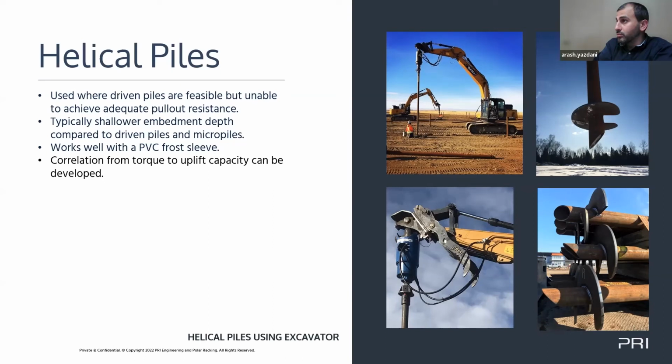As you mentioned, you can't get into sandstone or weathered bedrock with a helical pile. With a driven pile, I actually welcome that. If you can find a sandstone or a weathered rock layer within 7-8 feet, you typically penetrate that with a driven pile 2 to 3 feet, and that locks your pile in better than concrete. There is no popping that thing out. So with a driven pile, you actually kind of want weathered rock. Where with a helical, you're just looking for soft soil, no boulders, no cobbles. If you do start getting into boulder cobble material, there is remediation for that. You have to spin it out, dig, hoe pack, resurvey, reinstall, which can be pretty costly and time consuming again.